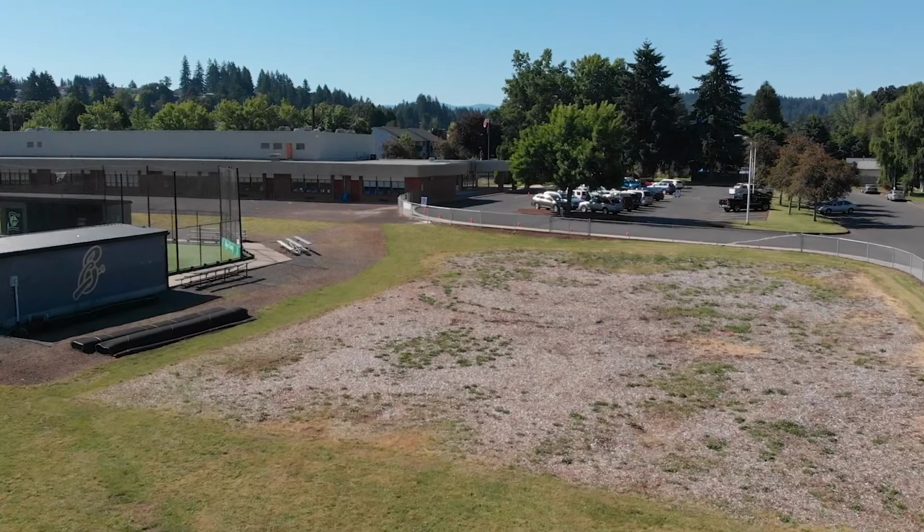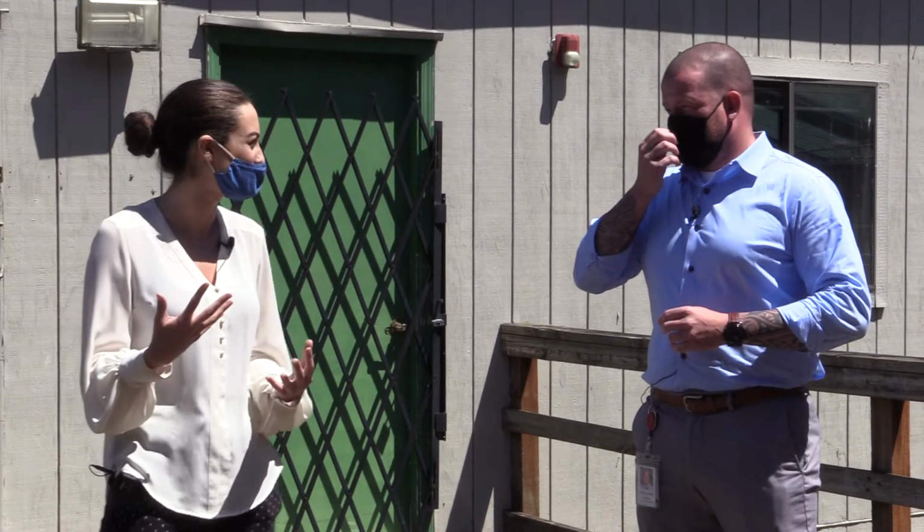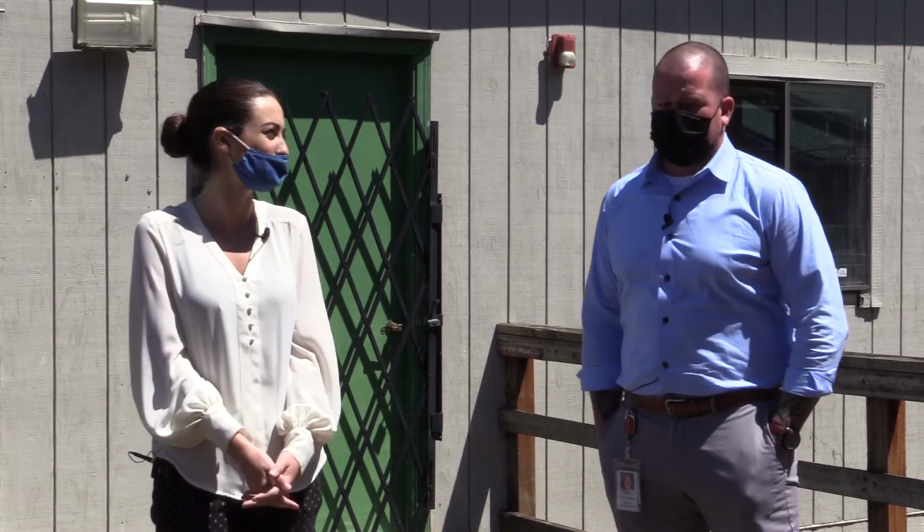Okay, and now is this the only portable that we will be utilizing, or will we be purchasing additional units to house our students? Yeah, good question. We are purchasing a brand new unit for approximately $194,000. That is being built as we speak right now. It's a brand new unit, so that won't be here till about late August, early September. That's why we're working on this unit here right now to renovate and have it ready by the start of the school year.